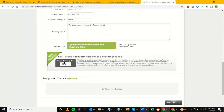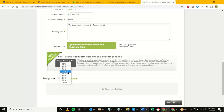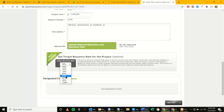Down below we have a 'Set Target Recovery Rate.' Because of CalGreen, the requirement is 65%. But some projects might have to adhere to a higher diversion rate — if it's a LEED project or for whatever reason the project needs to target higher recovery, you can raise the target. The minimum is 65% and it goes up to 100%, so you can set it to 65, 70, 75, 80, and so on. In this case we'll leave it at 65%.